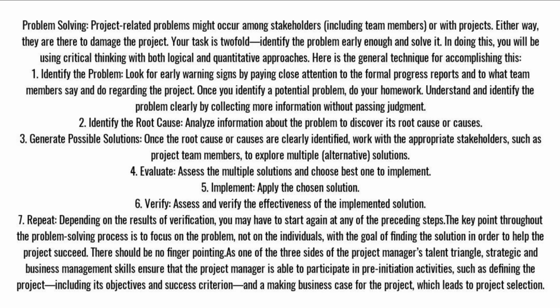4. Evaluate: assess the multiple solutions and choose the best one to implement. 5. Implement: apply the chosen solution. 6. Verify: assess and verify the effectiveness of the implemented solution. 7. Repeat: depending on the results of verification, you may have to start again at any of the preceding steps.